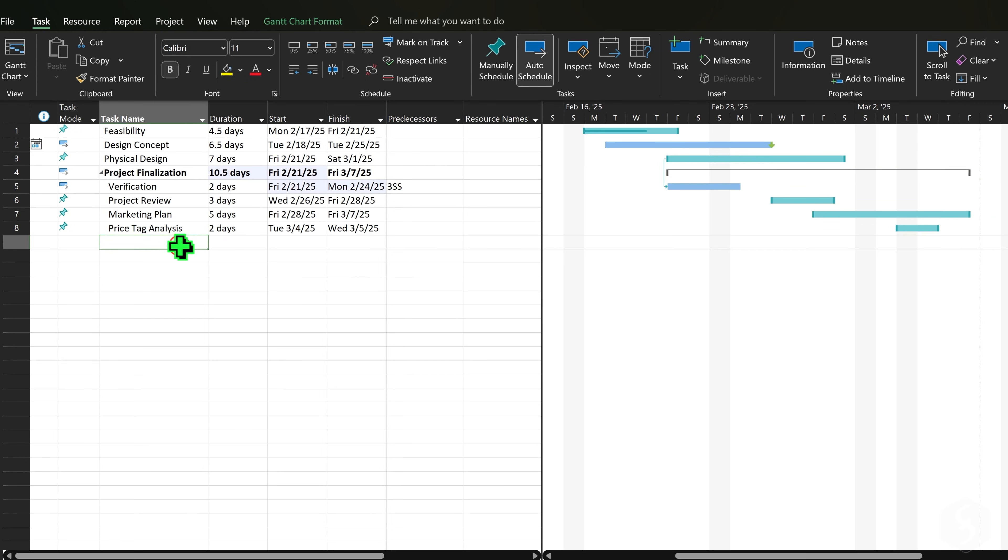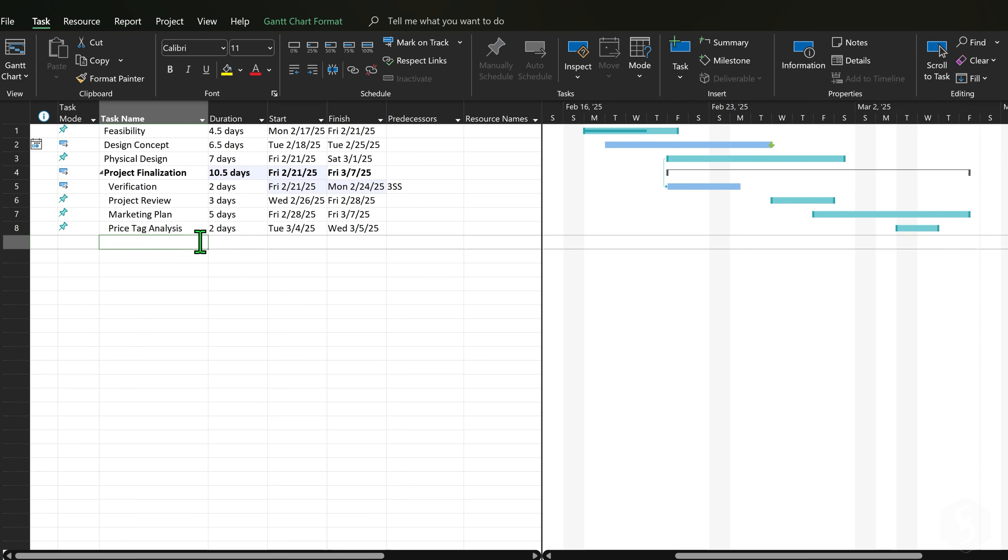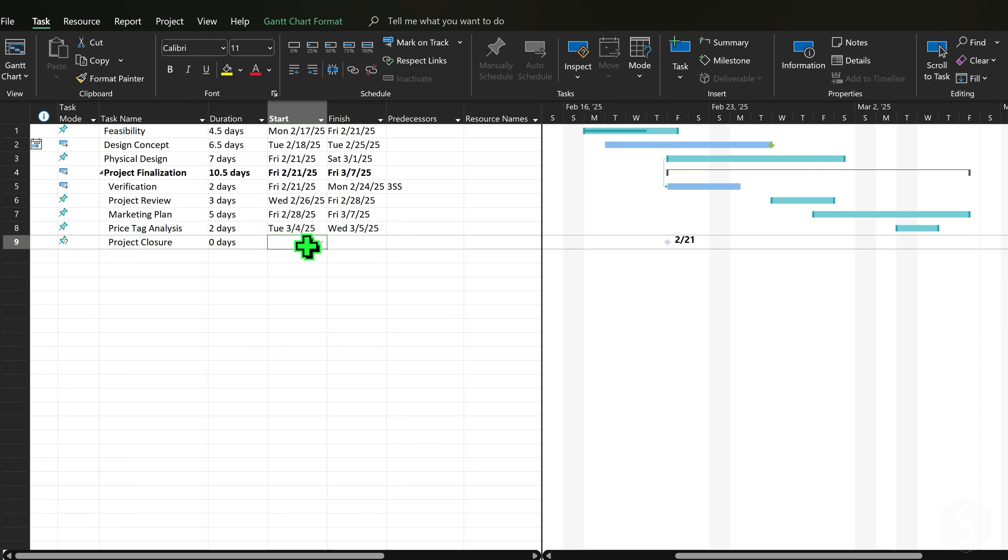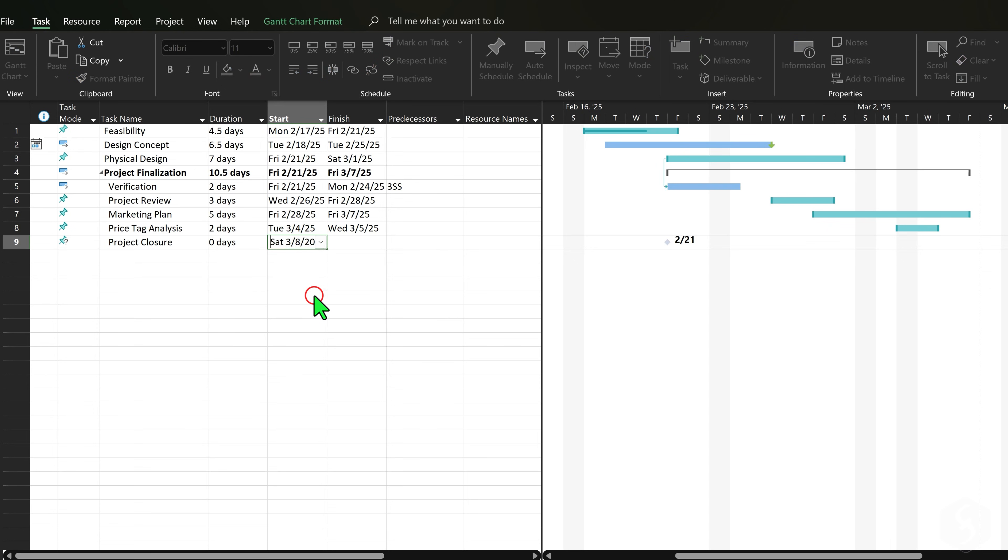From Task Insert you can also add milestones to track the main project objectives or checkpoints as diamond-shaped markers with the date in bold that you can edit and link these as seen for the tasks.